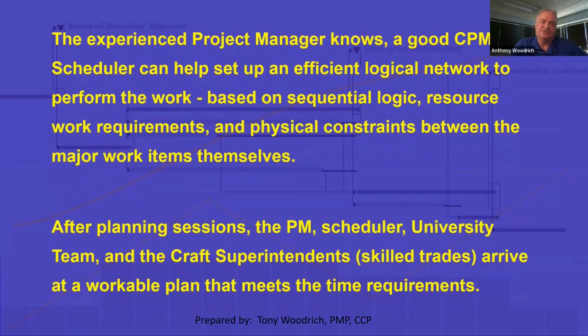After a planning session, the project manager, the scheduler, many times the university team and the craft skilled trades, the superintendents, they have input to sequence the activities so people aren't getting in each other's way, and that arrives at a workable plan that meets the time requirements.